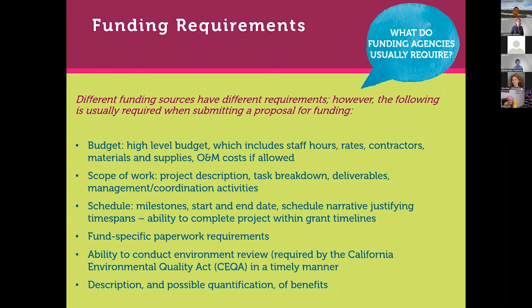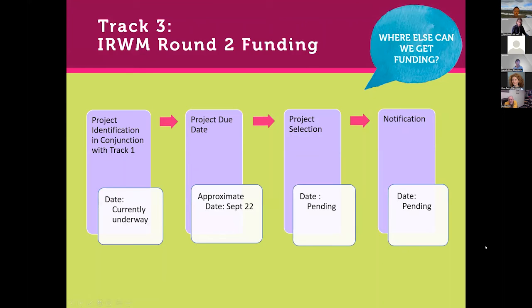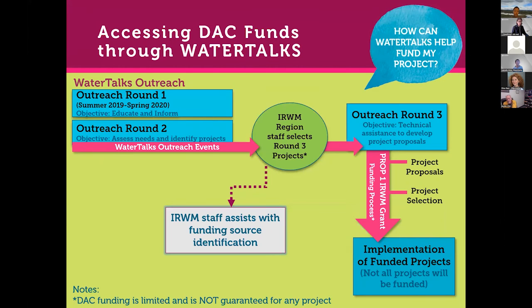In some of our work and work that Holly does, to get to this level of information to apply for a construction grant, it can take a year and cost $500,000 to do the preliminary engineering, the CEQA work. But this is what we mean by shovel ready. And that's ultimately the goal. But Spence, if you could back up to 58. Oh, actually, one more down, sorry.